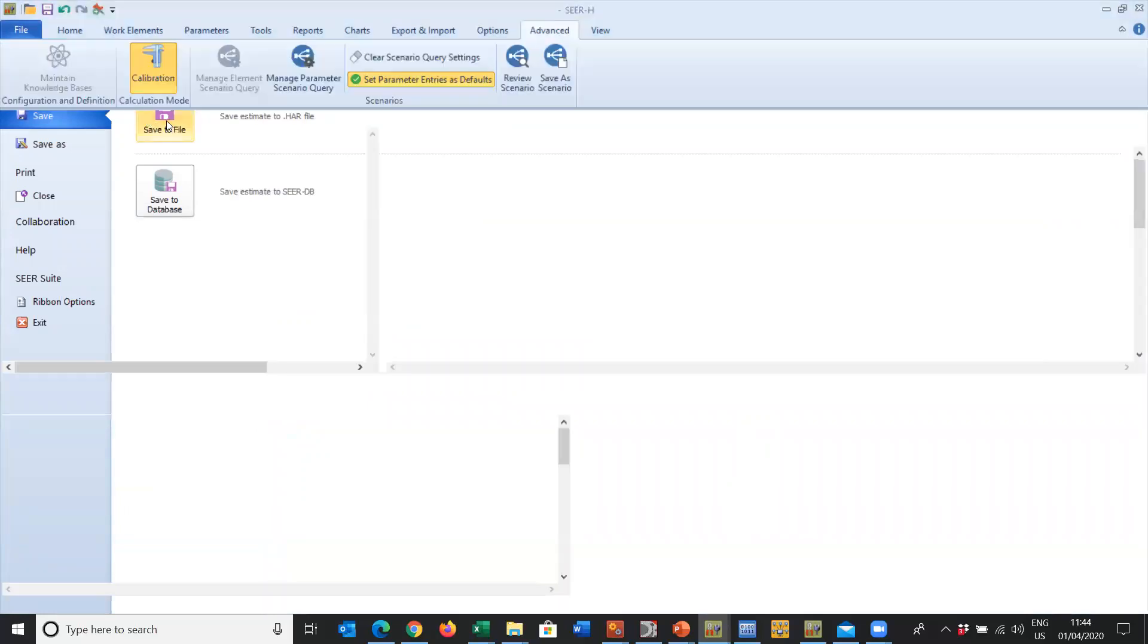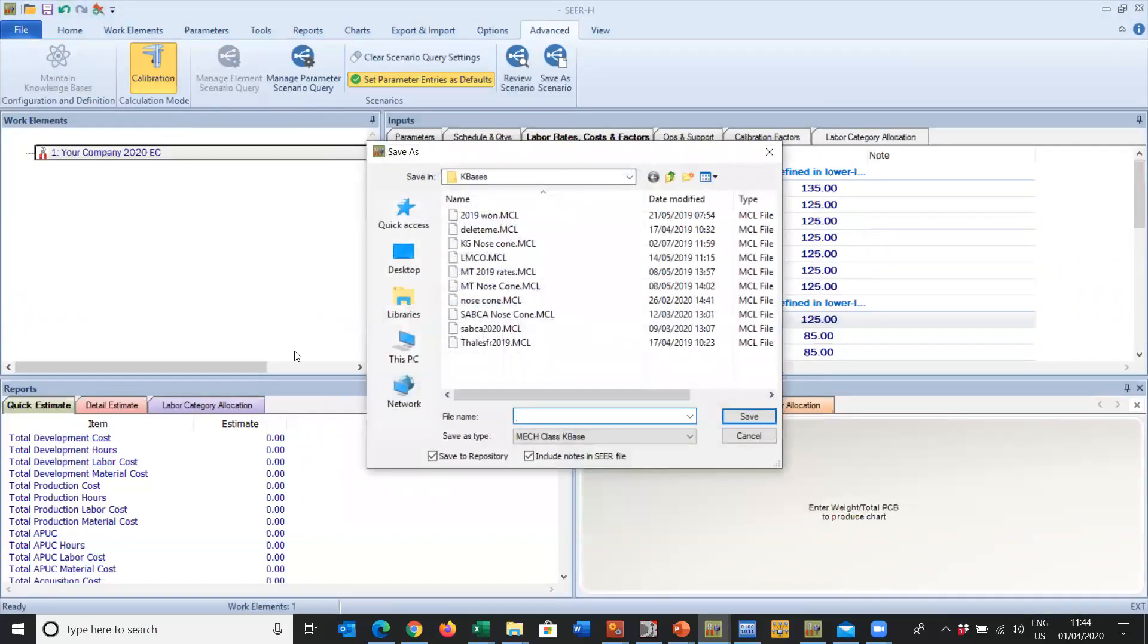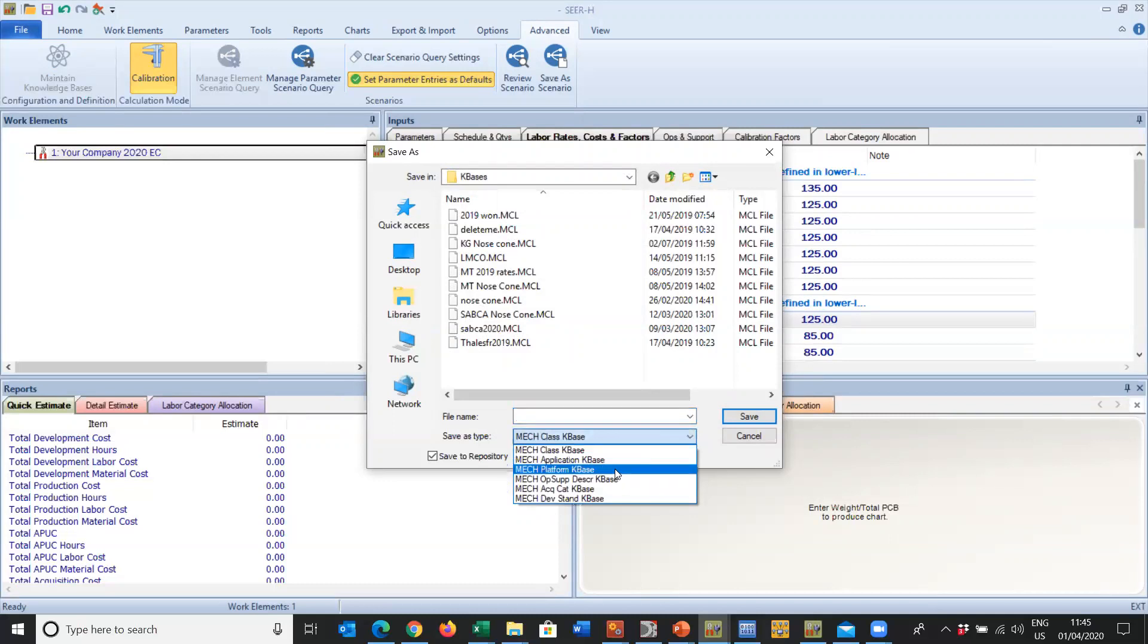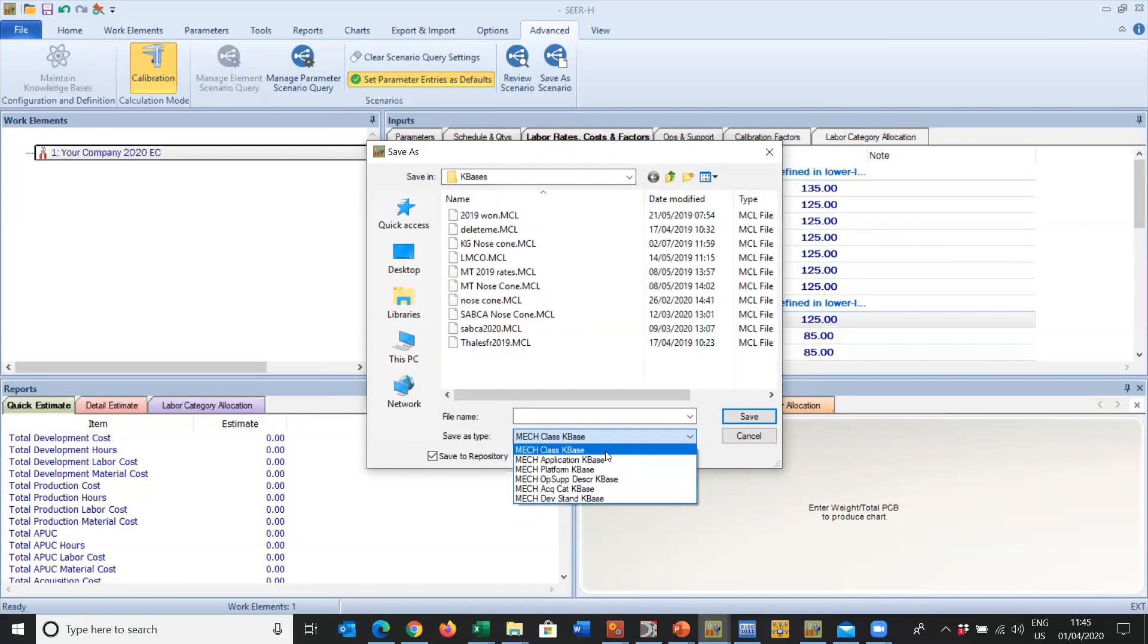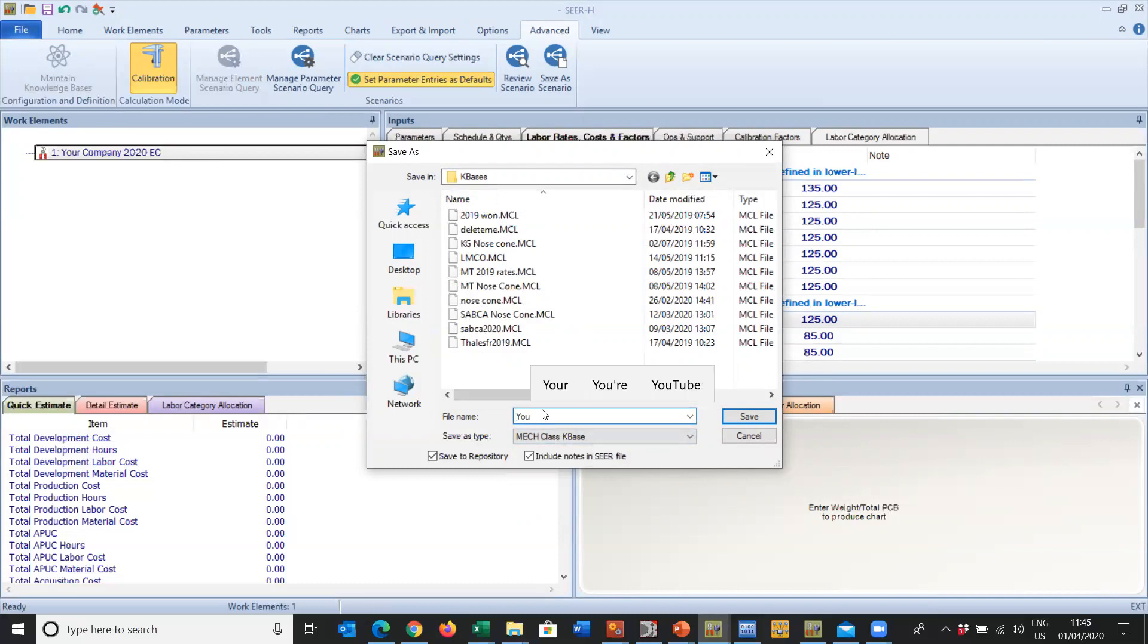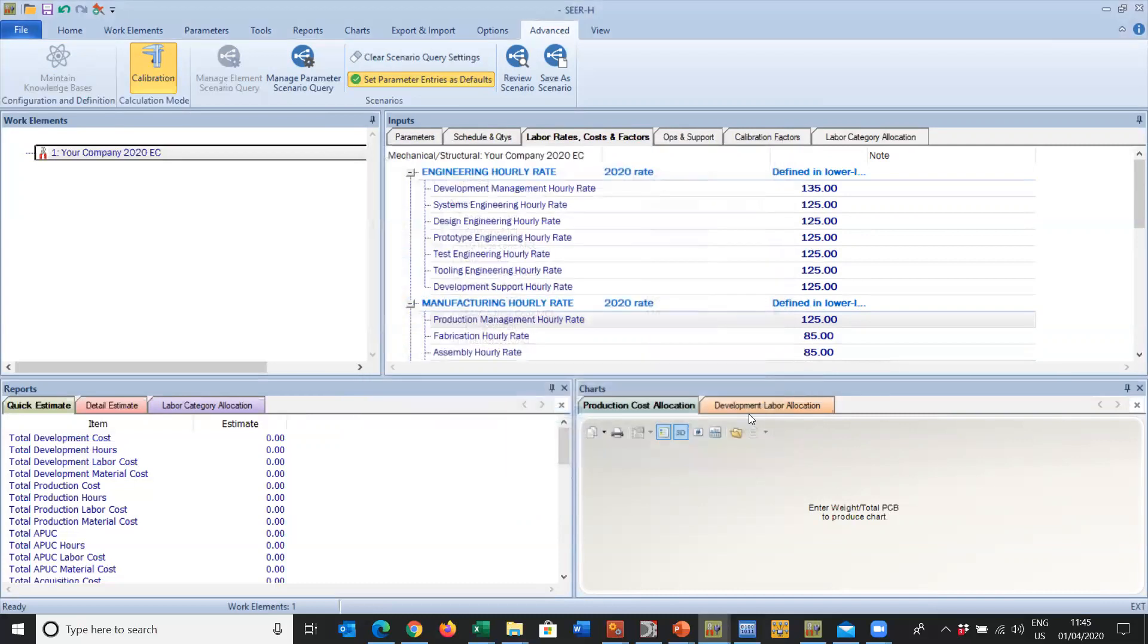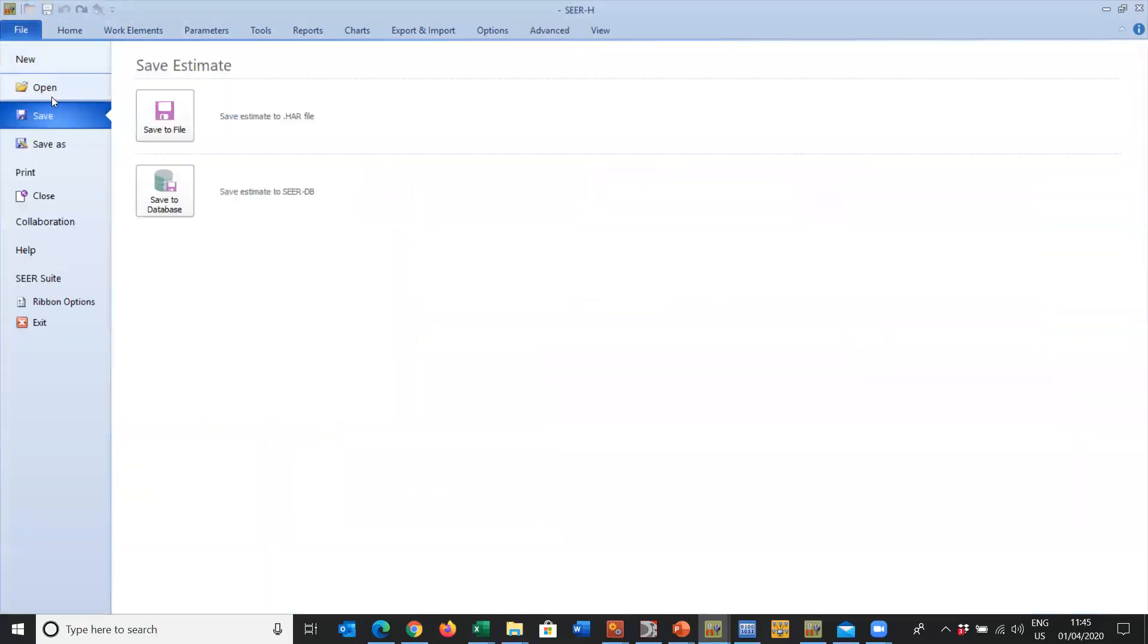That is it. We have captured the labor rates for our organization. We're happy with it, so we come back here and we're going to File, Save to File. It's automatically going to assume you're going to use a class knowledge base. We're going to save it into the repository and we can also include the notes in the SEER file, which we will do. You can save this as an Application, a Platform, ONS, Acquisition Development Standard, but if you remember back to training, the highest precedent within the model is the class knowledge base. We're going to call this Your Company 2020 and we'll save it.